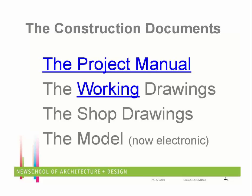So those two things are really in the architect's world. When we do a design build, it's in the world of the design build entity. Both sides have to be working on that, because I might say, you know, I really like those brass colored ones, and my estimator can say, well, that's fine. It's just that they cost like $3 each more. So for every door opening you drew, it's $10. And if there are 1,000 door openings on the building, it's $10,000. Now, how much do you like those brass ones?